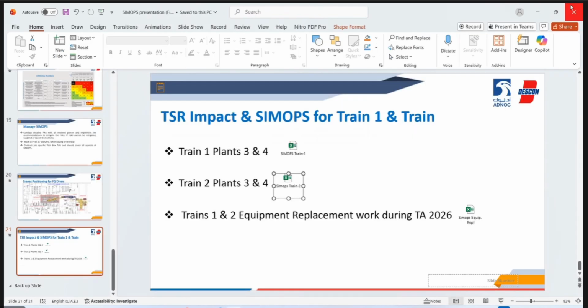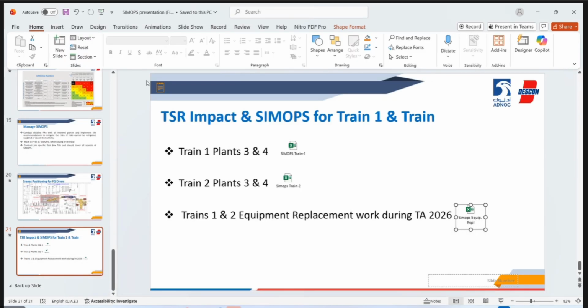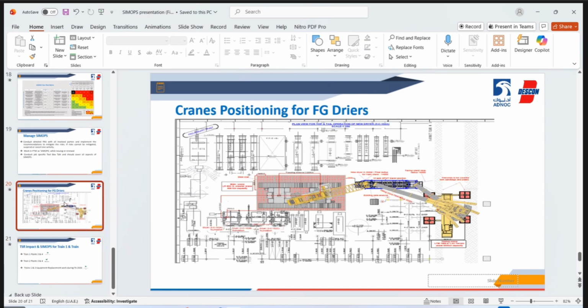And what is the type of crane? It is a 650-ton crawler crane. Crawler crane, okay. Yes. Very huge capacity, huh? Yes, very huge capacity because the weight of one of the dryers is about 126 ton. Oh, so what is the length of the boom? The length of the boom, I have to see, because I know the length of the dryer itself. It is about 18 meters.